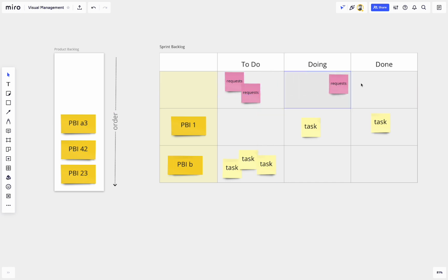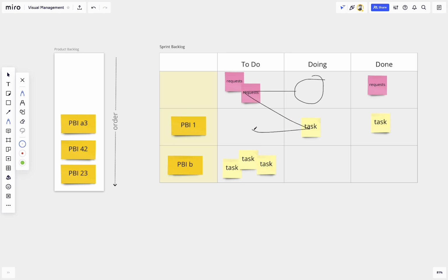The team will pick that up, move that on, and again, because we have the simple language of order, whatever's on top to bottom, and then also now we have this extra layer here of left to right. As a team member, how I scan the board for things to do is I first look here, then I'm going to look here, if not I'll look there, if not here, there, and you kind of zigzag your way through the board to see what I can work on, right?